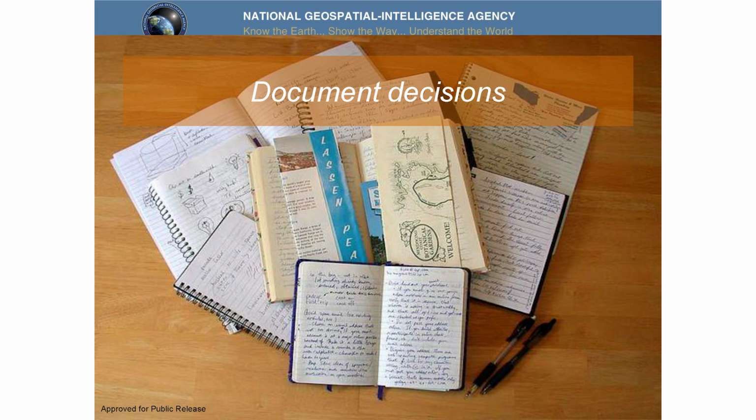And basically, we just couldn't ever really quite agree all of the time. And to make matters worse, we would meet 3 weeks later and not document the decision we had from the previous month. So then we have the same circular discussion all over again. So very important to document your decisions. So those are our 3 lessons learned and taught when working in teams.